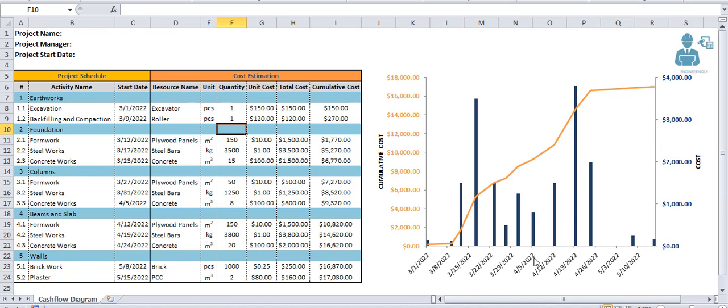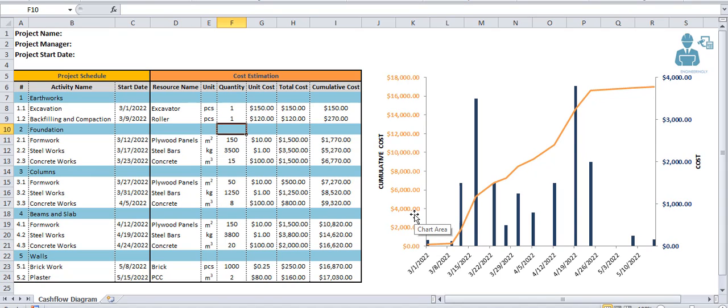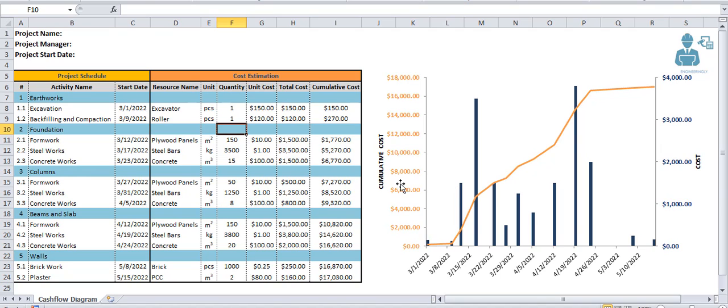In here, two vertical axes are shown. The first one is the primary vertical axis which represents the cumulative costs of the project. The next one is the secondary vertical axis. This shows costs at different time intervals.